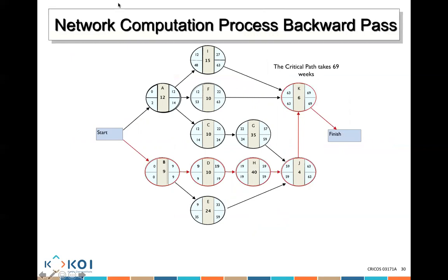But if we continue here, we need to calculate what is called the slack. What is a slack? To be able to calculate it, we have to use a formula. What formula? The formula is latest start minus early start, or latest finish minus early finish.